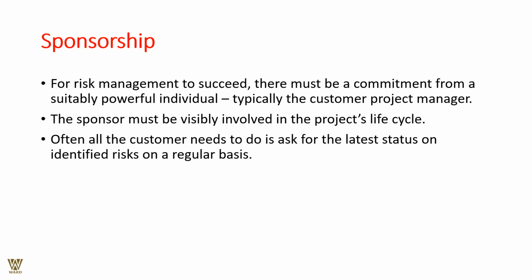Let us look at sponsorship. For risk management to succeed, there has to be a commitment from a suitably powerful individual, typically the customer project manager. The sponsor must be visibly involved in the project lifecycle everywhere. Often, all the customer needs to do is to ask for the latest status on the identified risks on a regular basis.